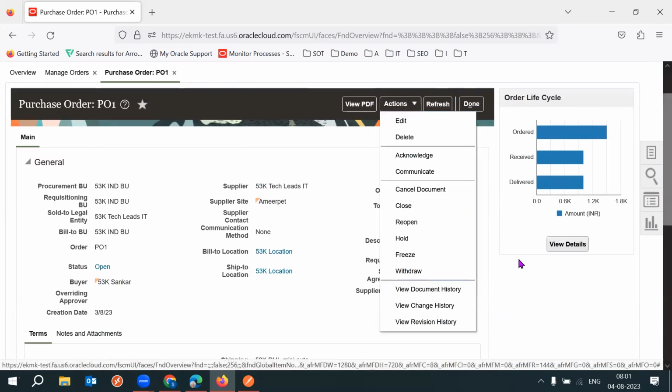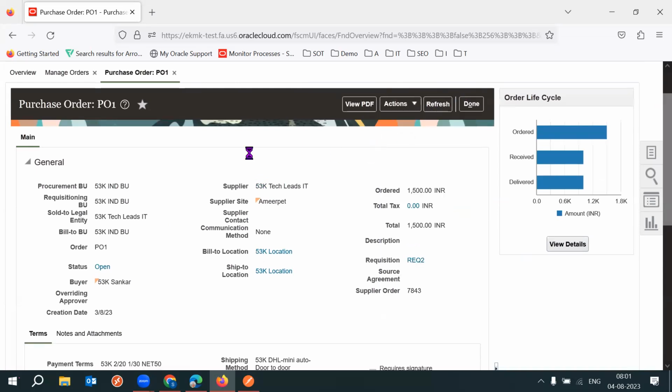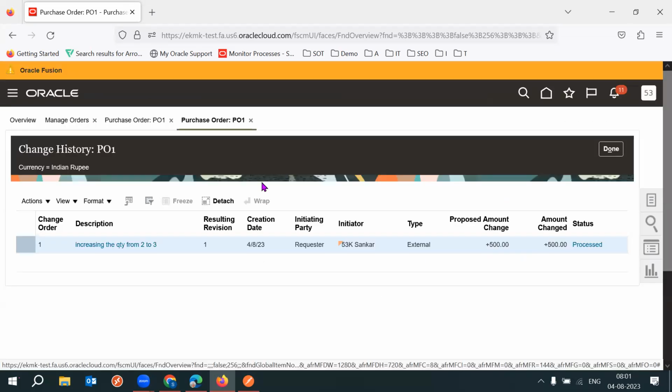If you go to actions and click on view change history, you can see the initiated party is requester. Who is the initiator? And what kind of change order is this? External change order. Why is it an external change order? Because this needs to be communicated to the supplier, right? Yes. That's why this is called an external change order. If you click on this hyperlink,